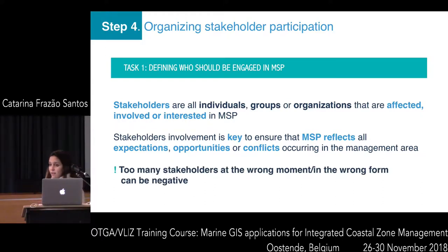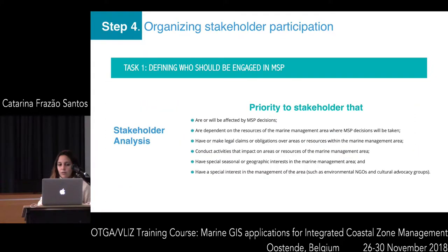At the same time, it is important to involve all the relevant stakeholders. Too many stakeholders, or stakeholders at the wrong time of the process, can be negative. So what we can do to ensure that the priority stakeholders are involved is to conduct a stakeholder analysis.